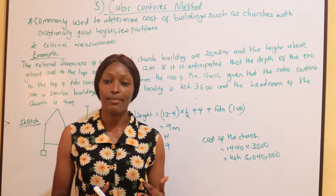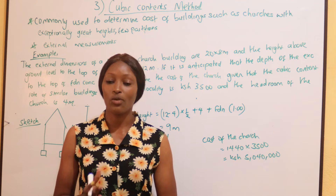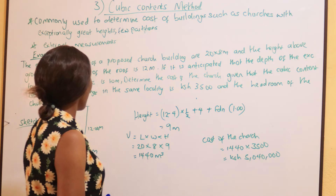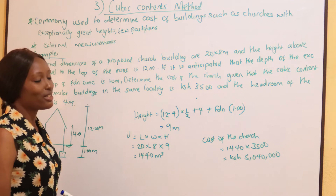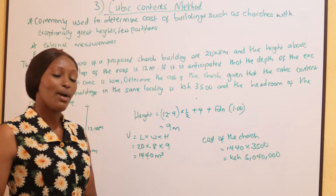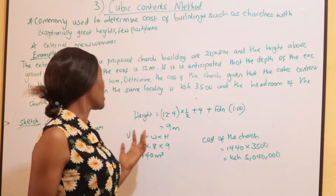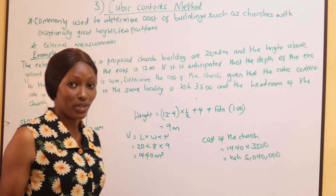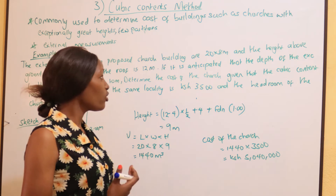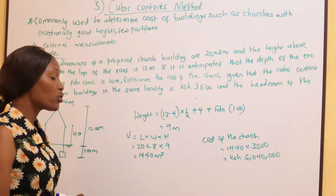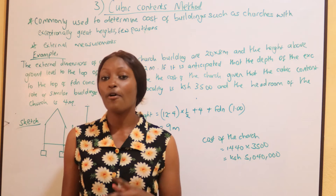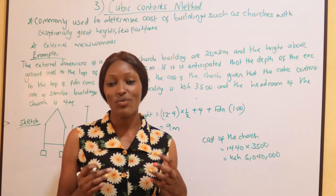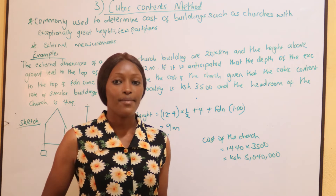The cubic content method is commonly used to determine the cost of buildings such as churches and cinema halls, which have unique features such as exceptionally great heights or few partitions. For the cubic content method, we usually use external measurements. Remember, the floor area method uses internal dimensions, but the cubic content method uses external dimensions.